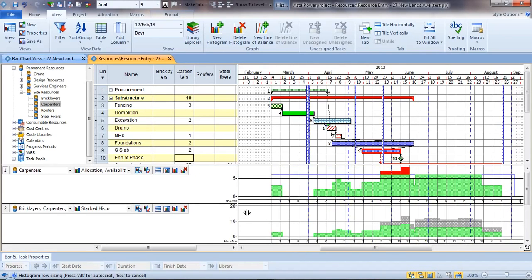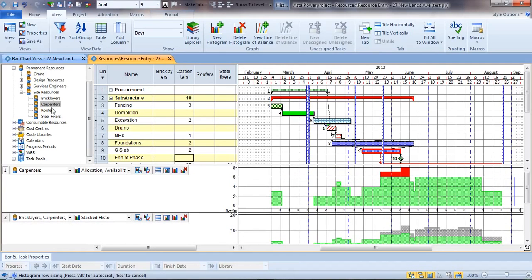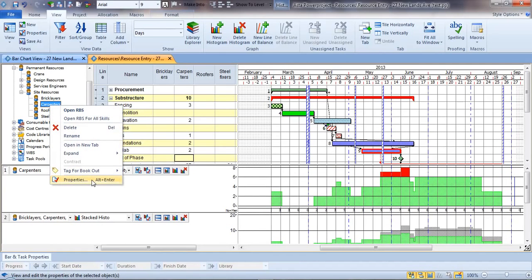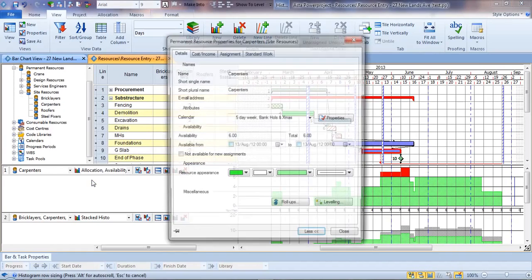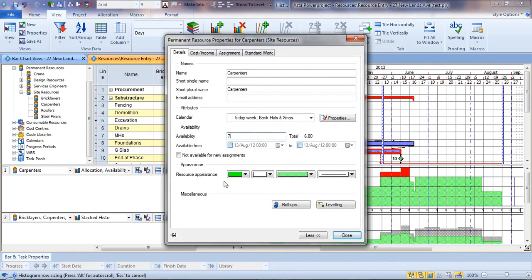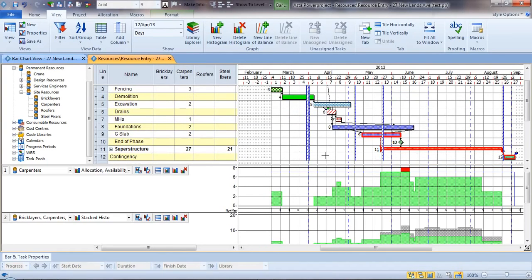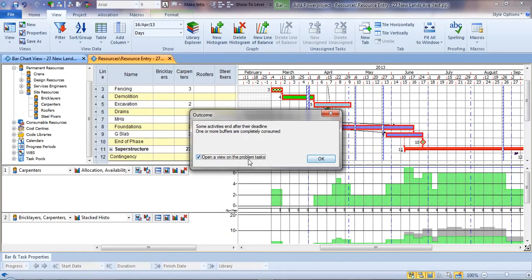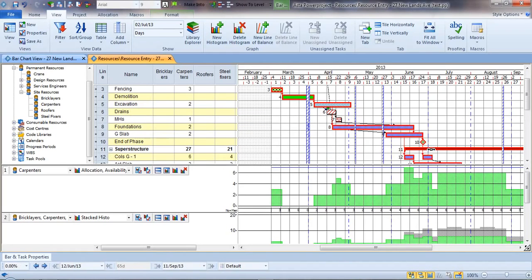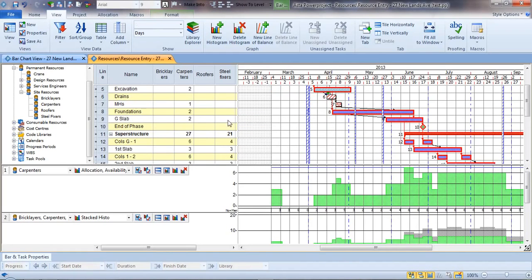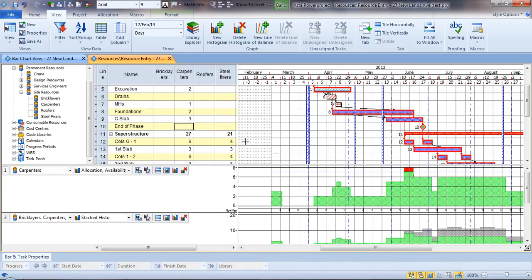So we'll just close that graph. So we've exceeded a capacity. I've given that capacity in the property. So maybe I say, well, actually, we're going to have 7 people on this particular process if we employ them. We've still got a problem with that, potentially, and we could reschedule to see if we can get rid of that issue, and it has overcome that issue, but there would come a situation where we wouldn't be able to resolve a problem in this circumstance.